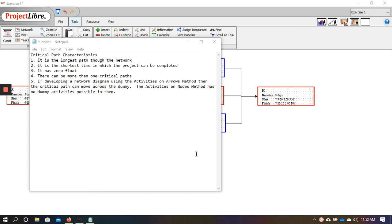This is a short lecture going further with the critical path. We have certain characteristics that are associated with the critical path. Number one, the critical path is the longest path through the network.